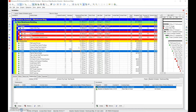So that is ultimately the responsibility of the contractor. Depending on whether it's the government's fault or our fault, we would name it either the recovery schedule or the schedule update. Now if you recover the schedule, before you start recovering you're going to do all the reports as a schedule update first — showing the negative float — and then you go through and do the recovery schedule with all the reports. So if you're behind schedule, you don't just do one set of reports; you have to do two sets: one for the schedule update and one for the schedule recovery.